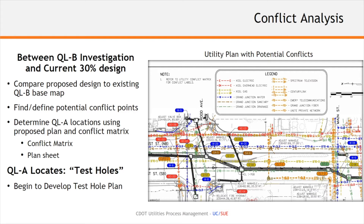At this point, we're really trying to identify where test holes are appropriate and where design modifications can be made. Once all this data is captured, it will be shown in the utility conflict matrix.